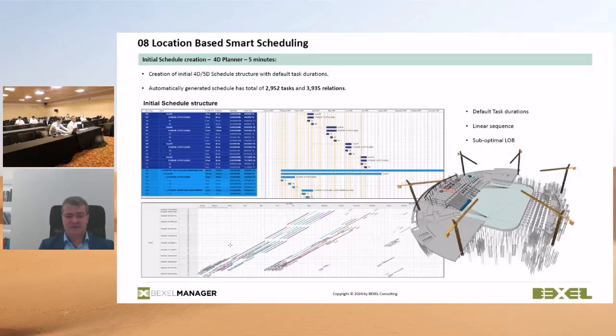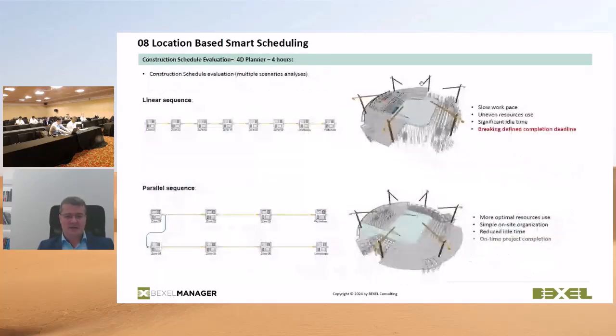And what is also very important, to each element, to each task, all the elements and their respective cost items are attached. So there is no manual process where you need to select a group of elements and attach them to the task, which is usually not very interesting, takes so much time, and is of course prone to errors. When the schedule is generated, then planners sit down with the project manager, and usually there are various what-if analyses.